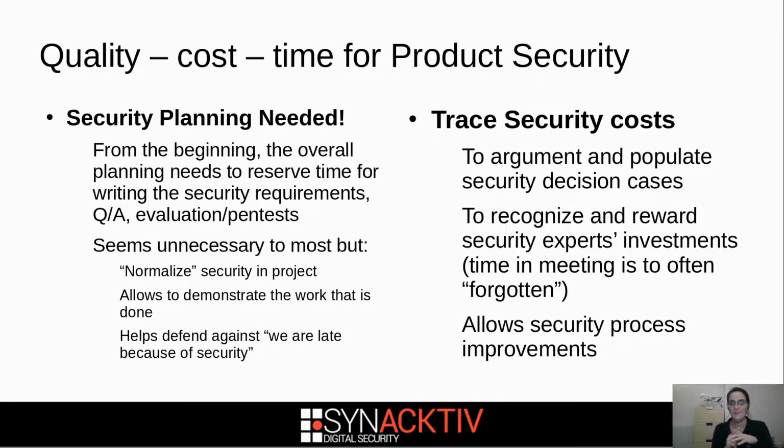Security engineers don't like that, but actually you have to have it. So you need a security planning. From the beginning, you should have in the overall project planning time slot reserved for security, typically for pen test. Okay, so you should have written somewhere in the project planning that before launch you should have, I don't know, maybe 1 month of pen test. Okay, same for quality, same for security requirements. You should be in the planning.